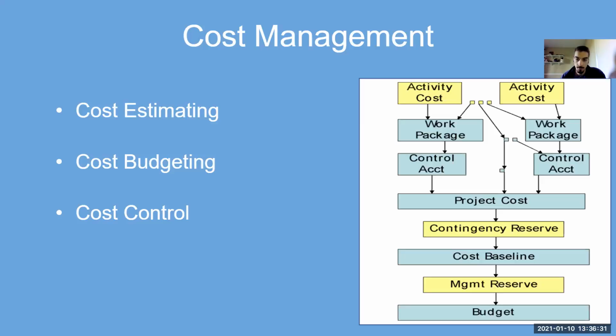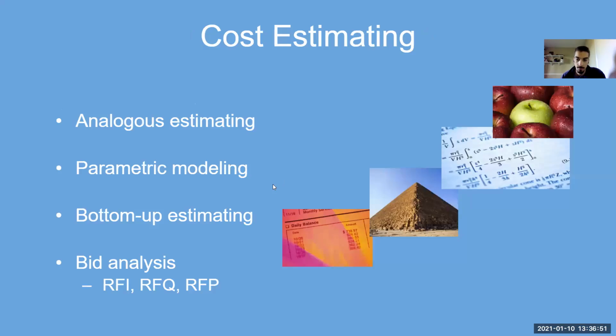Under very, very rare extreme cases where there's a very high risk task or activity, and you've flagged it somehow, maybe that one in particular, you can give it an extra risk, management reserve higher than the rest of the project. But other than that, it's best to keep it consistent. All right, so that's really it.